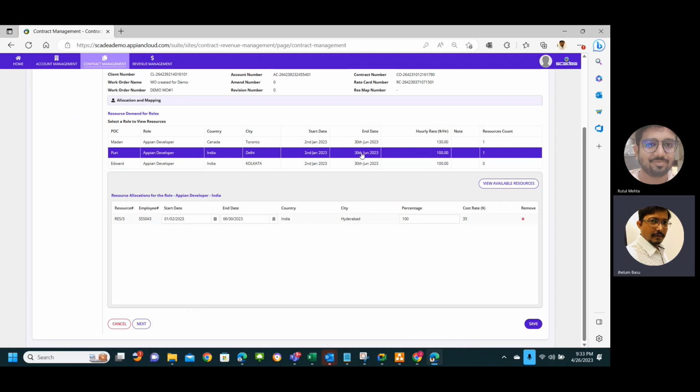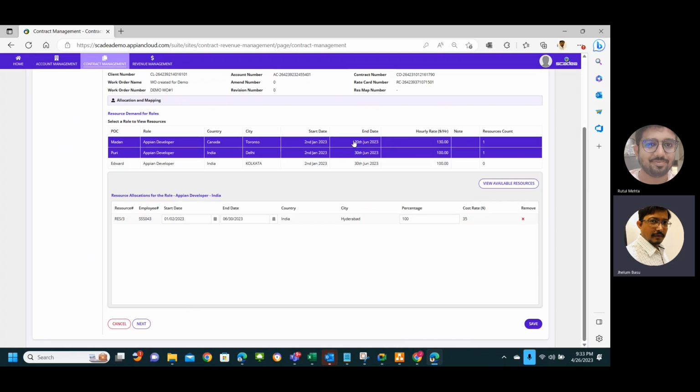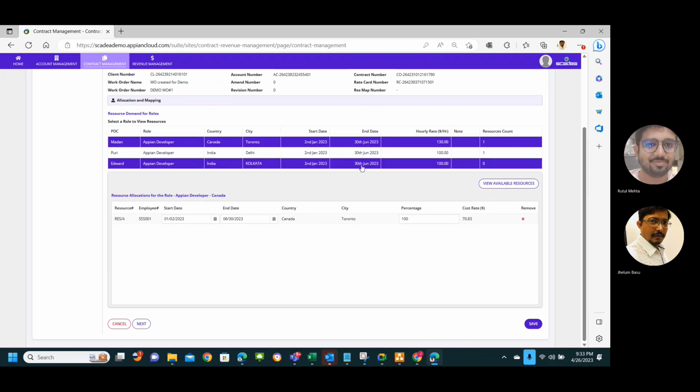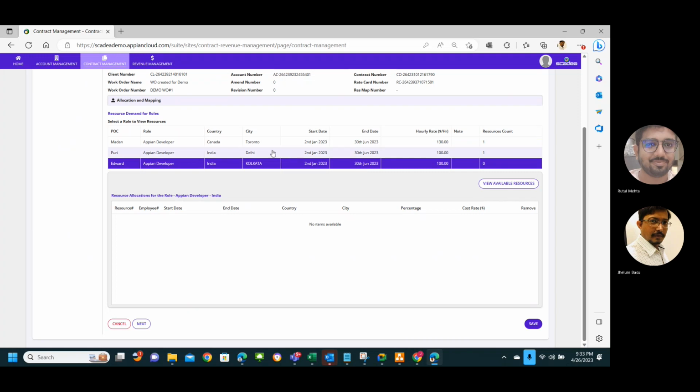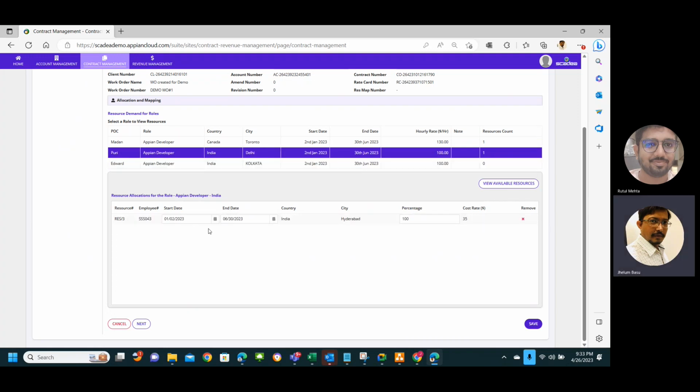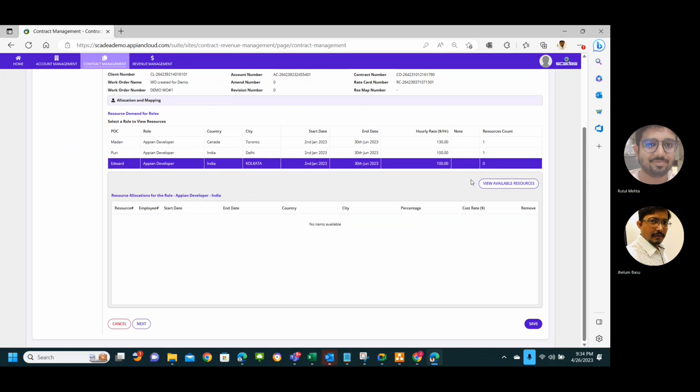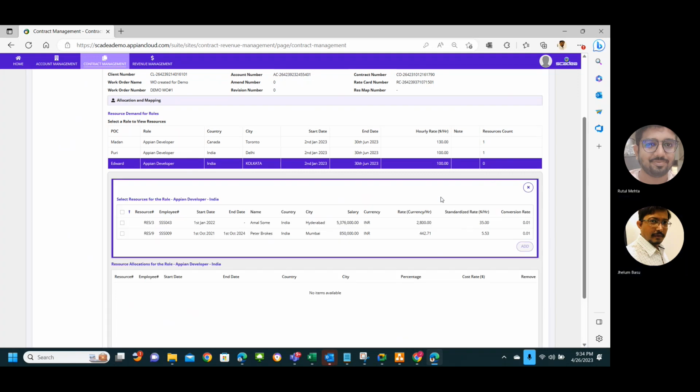Then I'm going here. If you click back here, you will see what my allocation is. Here I have allocated this guy whose ID is 43. And for this, we already have allocated this person, so let's not choose that person. Let me choose this one, because if we choose 100% allocation of this guy again, his allocation will be 200%.